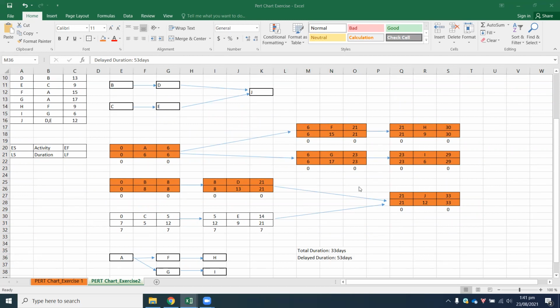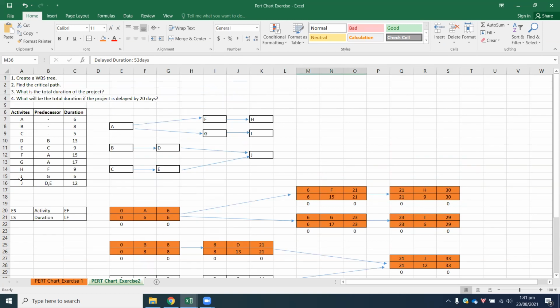Here we are given our work breakdown structure, but when we're doing our project, will we be the ones deciding which task is going to take how many days? Yes, you will be the one deciding that. In the major project, you will have to create the work breakdown structure on your own. At the moment, you have activities A, B, C, D till J. Over there, you'll actually be listing down what the activity is. If you do not want to write down, for example, preliminary analysis, you can give A dash and the name of the activity, and represent that by A.